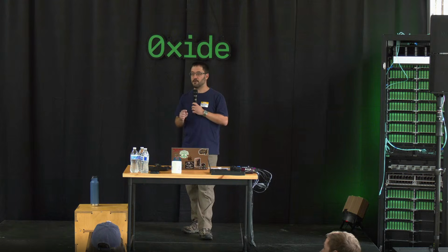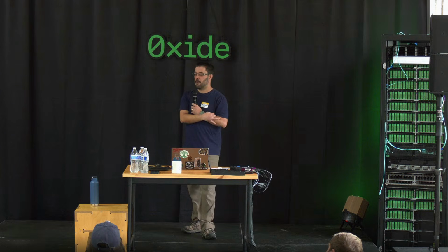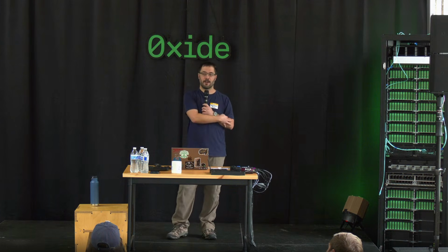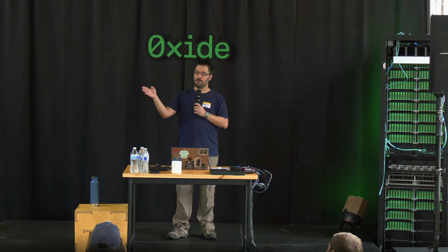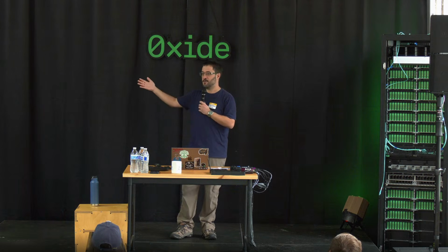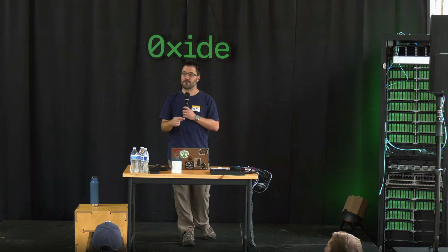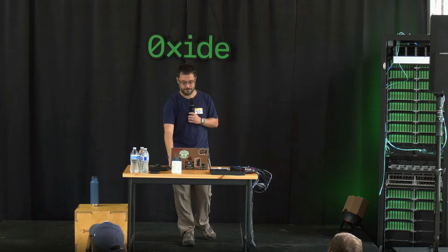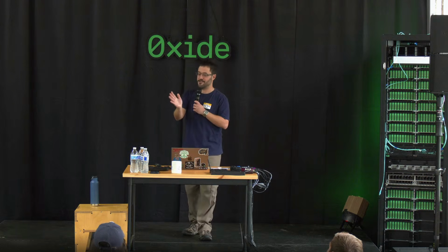This has been really hard for Update because, as I said at the beginning, so much of this needed to be in place for us to be able to do what felt like a meaningful demo. And again, the key is finding those smaller demos along the way, and that was hard. But the demo that we said we were going to do at OxCon late last year, like October last year, that I thought was going to be a couple weeks away, was more like 4 or 5 months away. But once we had done that, 4 or 5 demos came right on its heels, because we'd actually done so much of the system at that point that the extension was pretty small. So in retrospect, I wish I had spent more time trying to find the stuff we could have demoed sooner, because I wound up adding that back to the plan of, these are the demos we're going to do. Oh, we actually just did all these things.